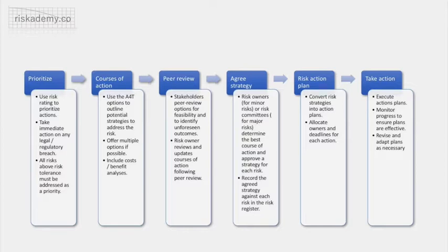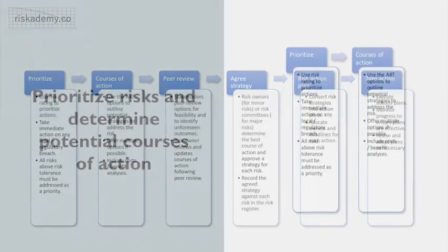One important point to bear in mind is that the longer the period from risk assessment to executing the strategy, the greater the chance that the situation may develop and risks could change. So let's go on and look at each stage in the process in more detail.